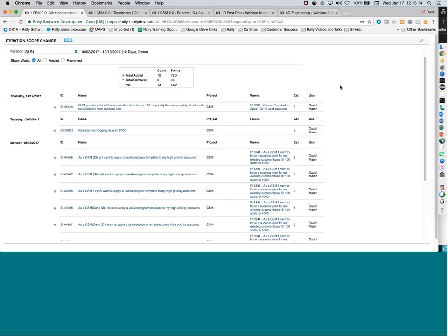The purpose of this would be to understand where you could potentially improve parts of the flow. If you have areas where items are sitting for a long time, maybe there's a WIP limit problem there, so you may need to adjust the flow to smooth that out, have things go through the system a little quicker. Generally, the lead time and cycle time are going to work together to understand what is the overall time that we're spending and where can we make some improvements to help items go through the process a little bit better.